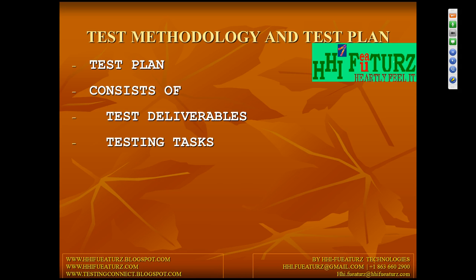This is important. Once the whole application is ready, what deliverables will you release to the customer? Each and every document you have used should be delivered to the client at the time of delivering the application. The deliverables are test cases, test reports, execution results, bugs, the traceability matrix, the test responsibility matrix, weekly status reports, daily status reports, sprint reports, everything. Those are the test deliverables, sent along with the application.